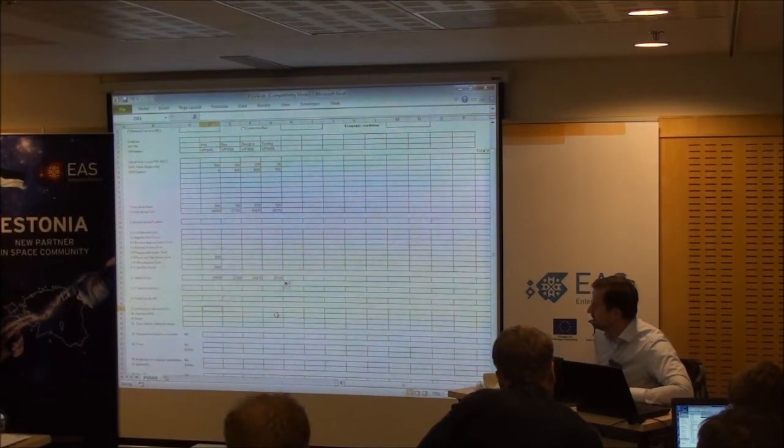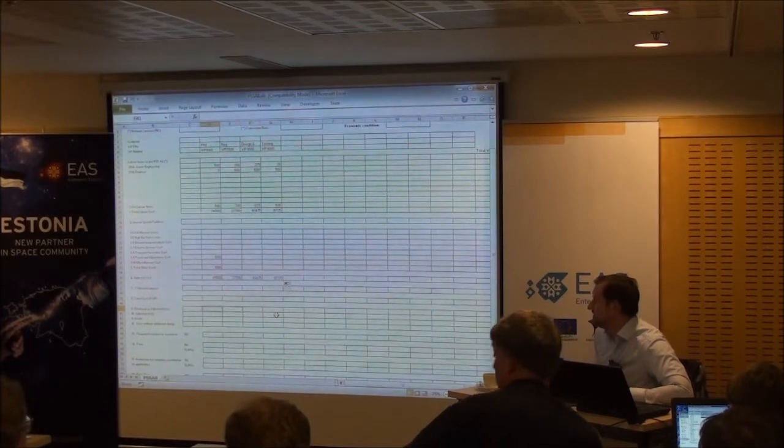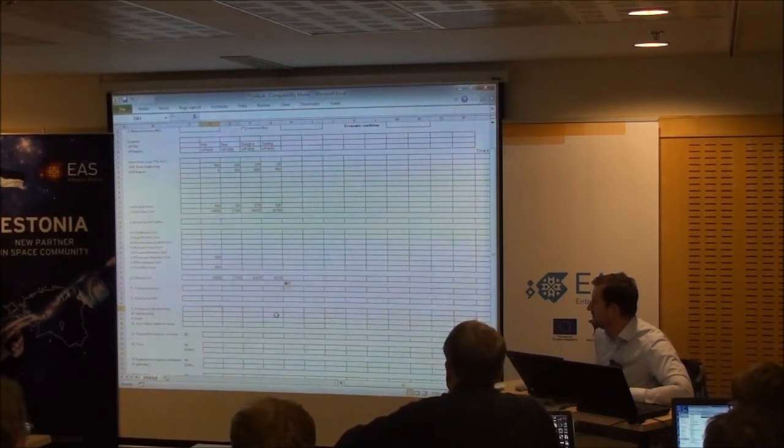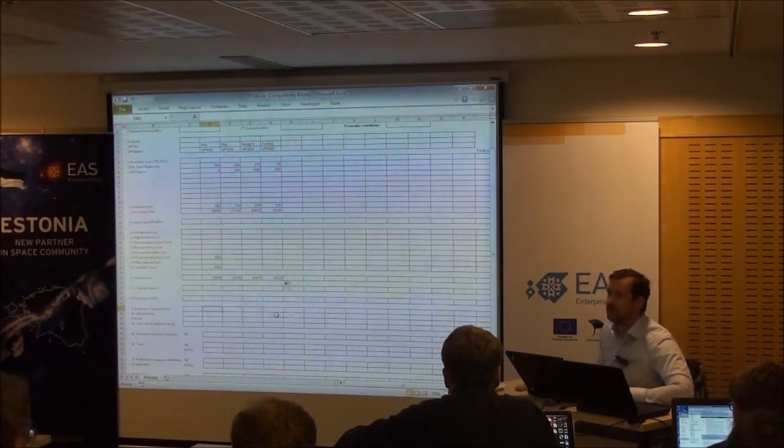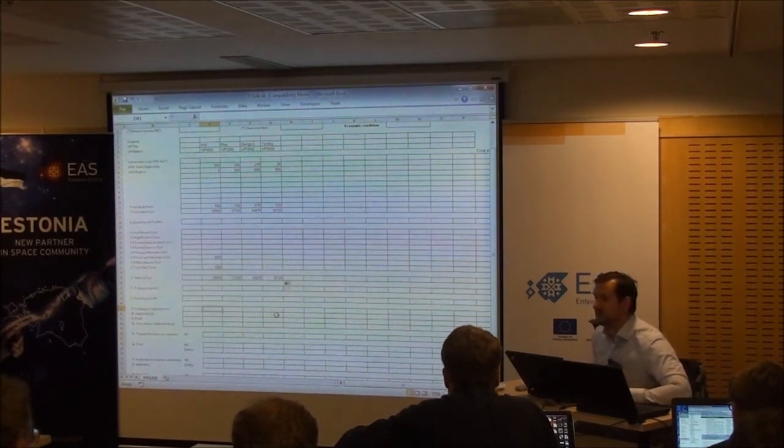It's hard to say what ESA will support, but typically I've never seen them be very happy with anything more than 4%, even if they get happy with that. So for a small contract, I would try to make it as close to zero, if not zero, because mainly the job's not big enough to affect things too much.